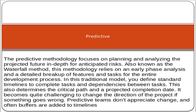In the waterfall approach, you cannot go back to a previous stage. For example, if you have started user acceptance testing, you cannot return to the development phase — you must proceed forward. It flows from top to bottom sequentially. The predictive approach also does not welcome changes, and buffers are often added to the timelines.